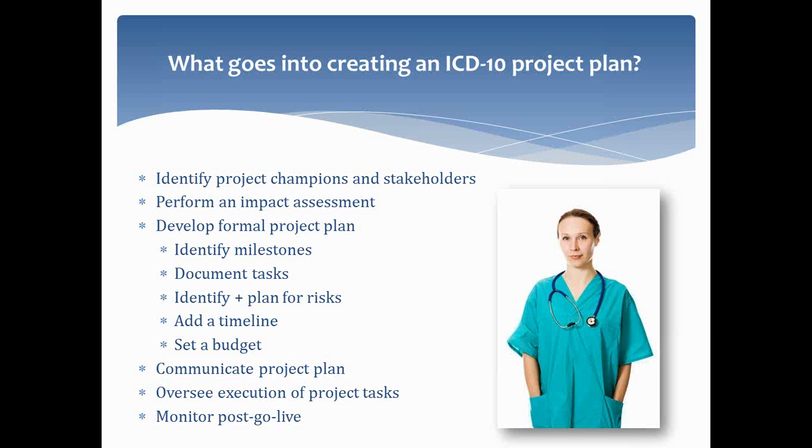Check with any organization or vendor where you might have an interface into your PM or EMR that would require ICD-10 codes. And make sure that you're working with your vendors to schedule training and schedule any upgrades, which everybody who has a PM and EMR system will need to schedule with their PM or EMR vendor, or your vendor might be able to do that remotely if it's not a big deal. And then schedule the testing, schedule go-live timing, and understand what the different vendors have in place for ongoing support.